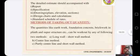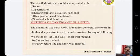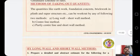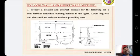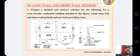Methods of Taking Out Quantity: Quantities like earthwork, foundation, brickwork, concretework, plinth and superstructure etc. can be worked out by any of the following methods: the first is the long wall–short wall method, the second is the centre-to-centre line method, and the third is the partly centre line and short wall method. By the long wall–short wall method, prepare a detailed and abstract estimate for the following drawing for a semicircular residential building. Add up the long wall and short wall method and use local prevailing rates.